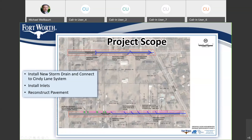In terms of timing, as I said, we're starting the project in March. The storm drain lines will come first, and the contractor has scheduled work to begin on North Hill Lane. When they've completed the storm drain on North Hill, they'll move to Greenfield Road to do the storm drain. While they're working on storm drain on Greenfield, they'll be paving North Hill. Then they'll finish up with Greenfield.